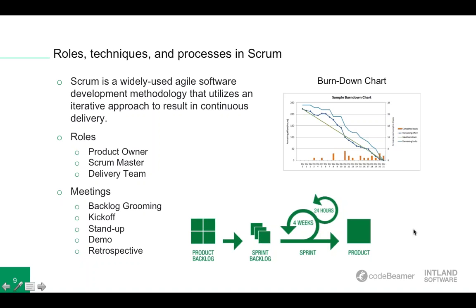The Scrum Framework defines how you should build your teams and what roles should be fulfilled in your teams. A Scrum team is usually a small team of usually 8 to 10 people with members in 3 different roles. One product owner, they represent the customer of your product, and they make sure that what the Scrum team is doing and working on is what the customer wants and expects.